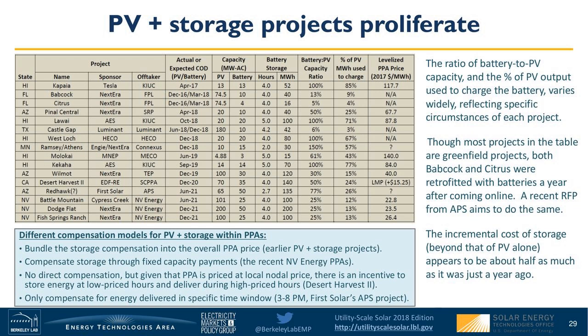And then finally, I'll just note that the storage element is being compensated within PPAs in several different ways. In some of the earliest projects, the price for storage was simply rolled into the overall energy price on a $1 per megawatt hour basis. More recently, we've seen the storage component compensated separately through a fixed capacity payment.